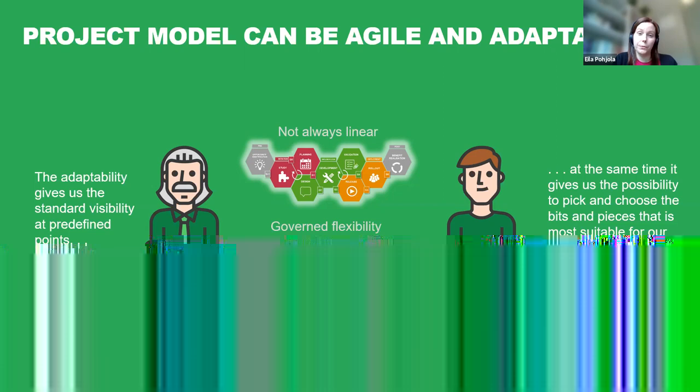you can start that agile team and the agile team work just in the same way as you would do an investment decision on your project. You decide that you're going to invest in whatever service or product you are doing. That team decision is approved. You're approving the resources for this development. And then later on, as you clarify the vision for the team composition, that's another governance point, approving the development initiative.